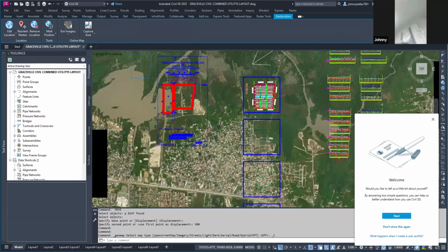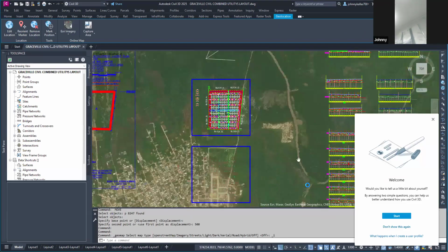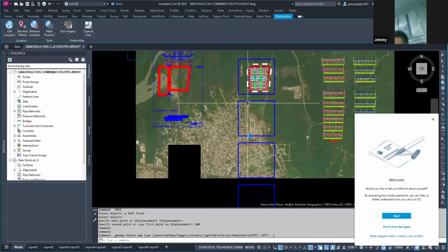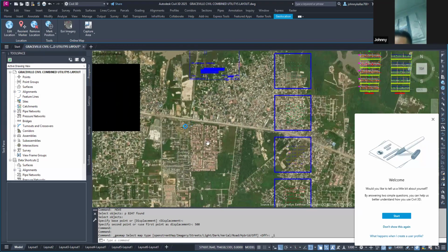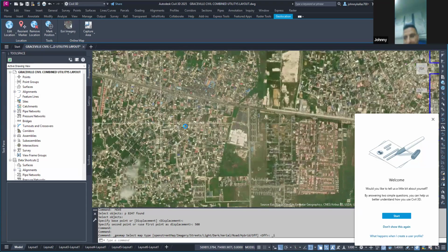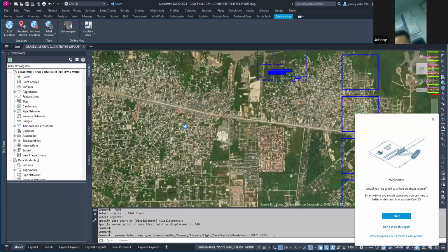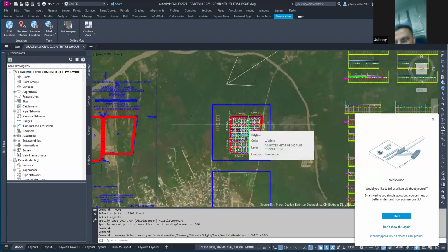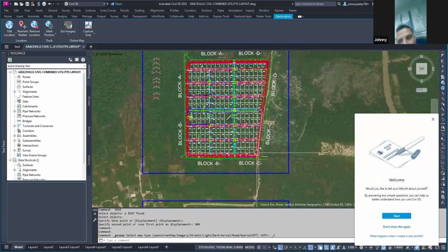First of all, this is the location of the site. This is Fara Park Estate, and Sangotedo is around this place. At the beginning, when we started the project, we requested the Surveyor General to come and give us an official benchmark. He gave us the official benchmark, and we started our exercise. So we created a benchmark inside